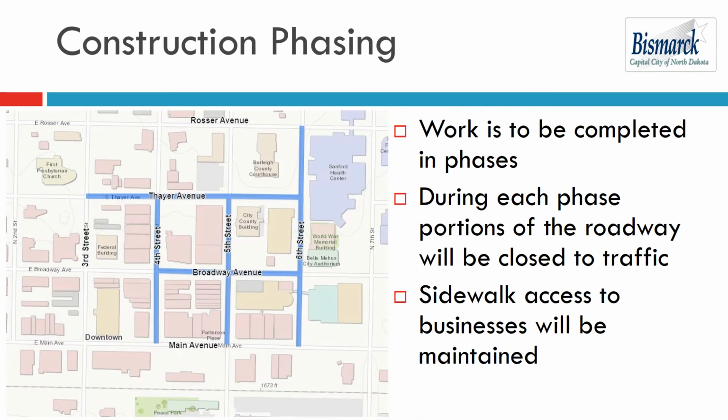The construction of the proposed project will take place in several phases, which will require the roadways to be closed to traffic and parking. Advance notification will be given to business owners on the roadways to be closed. Businesses are asked to work with their product delivery companies, notifying them of the closures and developing alternative methods of receiving deliveries. As mentioned earlier, the majority of the sidewalk will remain except at the intersections where proposed curb extensions and pedestrian safety improvements are to be made. Business access from the sidewalk will be maintained during the construction of this project.